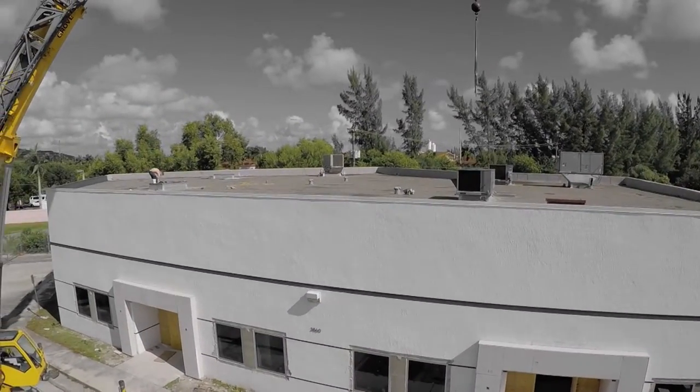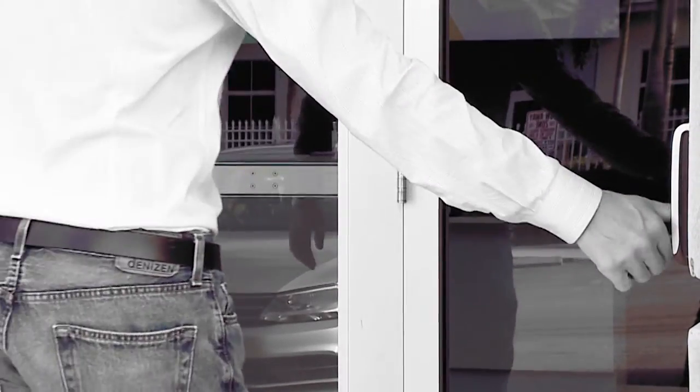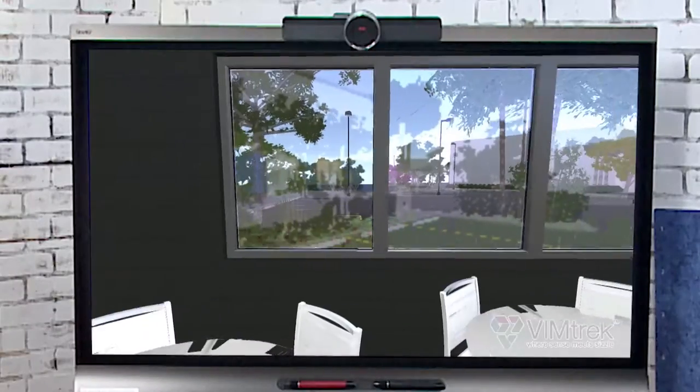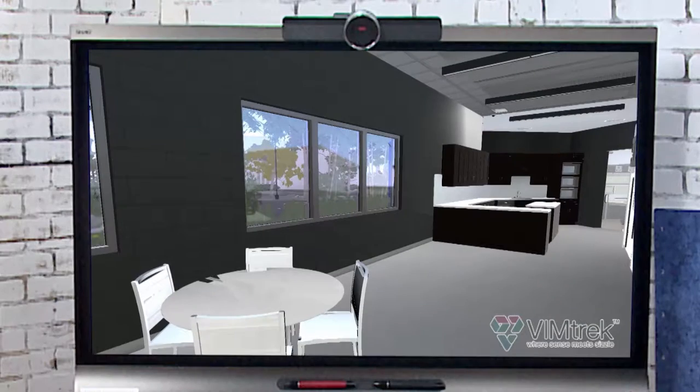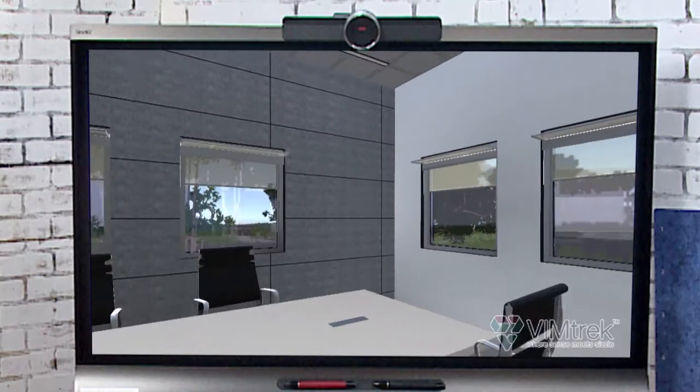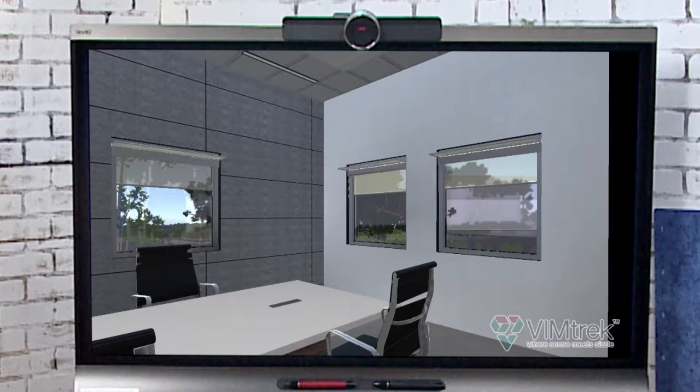One of the reasons the doors are delayed is we need to get the electronic hardware installed on the doors for the building access system. I'm working with Wausau Windows in order to specify the appropriate window, glass, and framing for the exterior windows in the building. I've designed new window openings because before it was a warehouse, and we really require a lot of natural daylight for an office space for employees to be productive and feel happy.